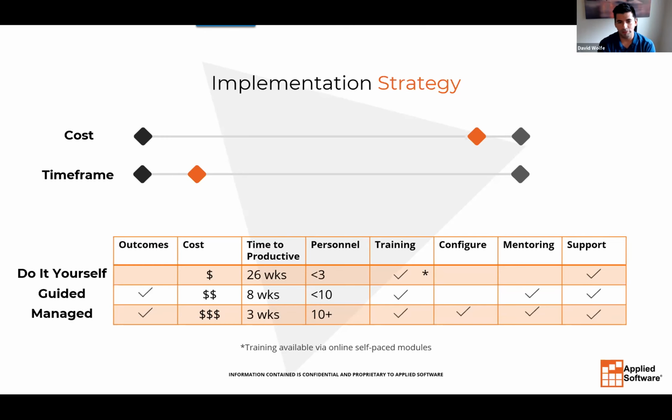You're going to look around 25 to 30K to budget for that. What that would get you is we're looking at creating a project template for you, maybe 5 pipe specs, running through and creating some custom catalog content, configuring some ISOs, user training, and a bucket of hours, maybe 10 to 20 or 30 hours, for you guys to do Q&A sessions. So there's a lot of configuration work that goes into there.